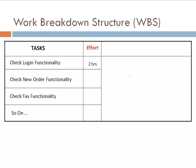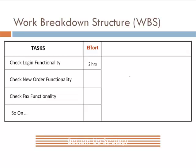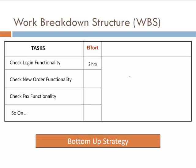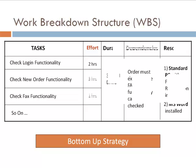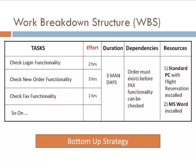I hope you made an educated guess on the effort required. This is bottom-up strategy for test estimation. The technique is called bottom-up since based on the tasks which is at the lowest level of the work breakdown hierarchy, you estimate the duration, dependencies and resources.